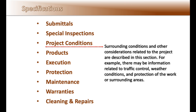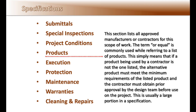The project conditions section describes the surrounding conditions and other considerations related to the project. For example, there may be information related to traffic control, weather conditions, and protection of the work or surrounding areas. The products section lists all the approved manufacturers or contractors for this scope of work. The term 'or equal' is commonly used when referring to the list of products — meaning that if a product being used is not one of those listed, the alternative product must meet the minimum requirements of the listed product, and the contractor must obtain prior approval from the design team before use on the project.